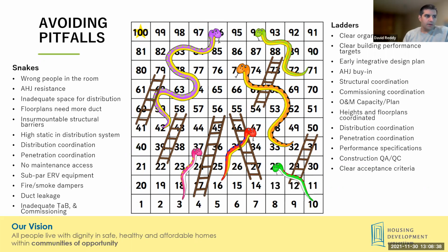And then keeping everybody in the loop throughout, what maybe seemed reasonable at the end of SD, once further work is done in early DD, to make sure everybody who is part of that early discussion is continued on to the refinement. And then getting buy-in from your building code official if you do need code alternates, early, to recognize those and engage, and I would say not shy away from it.